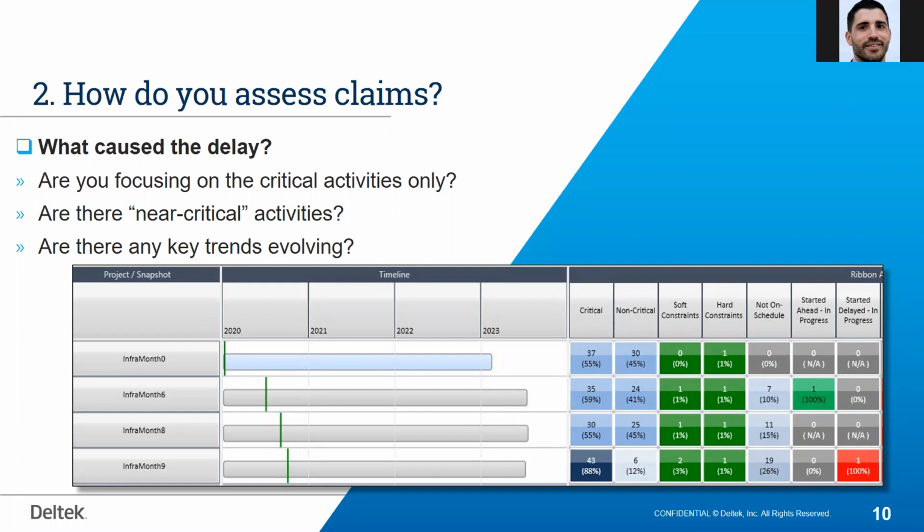So I have combined different out-of-the-box metrics. It's going to take 2 or 3 minutes for somebody to select these metrics and put them together in a playlist, and now I know that on a monthly basis, if I want to assess delays or whether my project runs into delays, I'm going to go through these Fuse analysis against these metrics. So these different metrics are a selection, pick and choose, different out of the box metrics. The blue box. Yes.